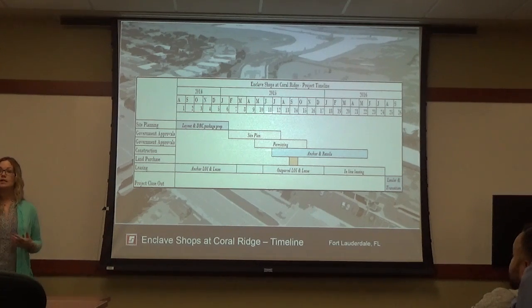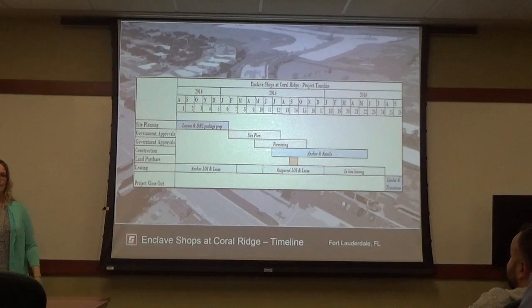And this went on until finally, which I was happy that we were able to do this, we got the building official to, which I understand is unusual, get every single reviewer in one room at the same time and review our plans. And then he actually took our plans, thankfully, and walked them around to each reviewer and got the sign off. And he said, I've never done this before. I've been working here 20 years.